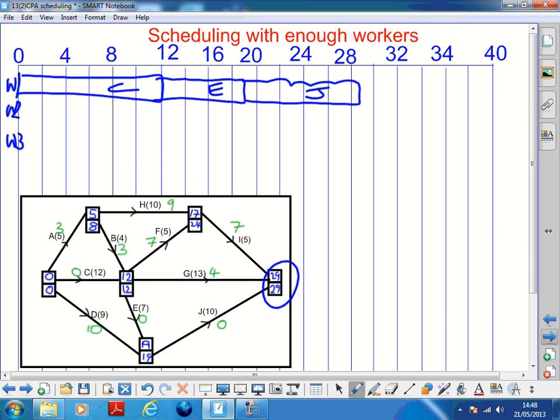So do you want to assign people some jobs? Job A needs 5 hours. Worker 2 is doing A. And then afterwards, I can give him H. What is sometimes a good idea is to just keep things as early. Rather than filling up worker 2, take your jobs as you move through the network and give them to worker 2 or worker 3, whoever's available.